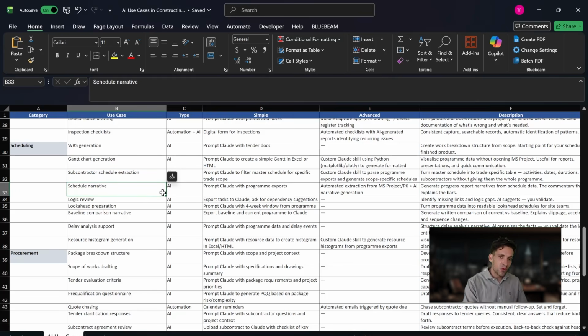You could help it review your subcontractor schedules, you could update your progress, so capture your progress in a work breakdown structure, percentage complete for each task, and each week just upload that into AI and get it to update your baseline schedule. You can help it to support extension of times claims by developing a schedule which has all the client milestones on the critical path.